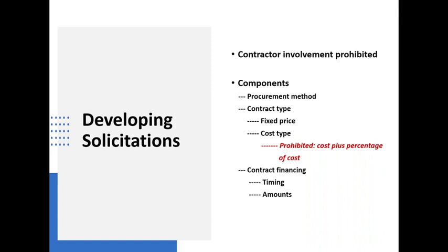And contracts under grants are a place where retainage is okay. Retainage means you hold back some of the payment until you're assured of full performance of all work or delivery. Okay? Once again, being a homeowner is good practice for dealing with this sort of thing. When you decide to add a half bathroom and the contractor still has a punch list of things to do before you release the final payment, that's the kind of leverage you want to maintain in this situation.